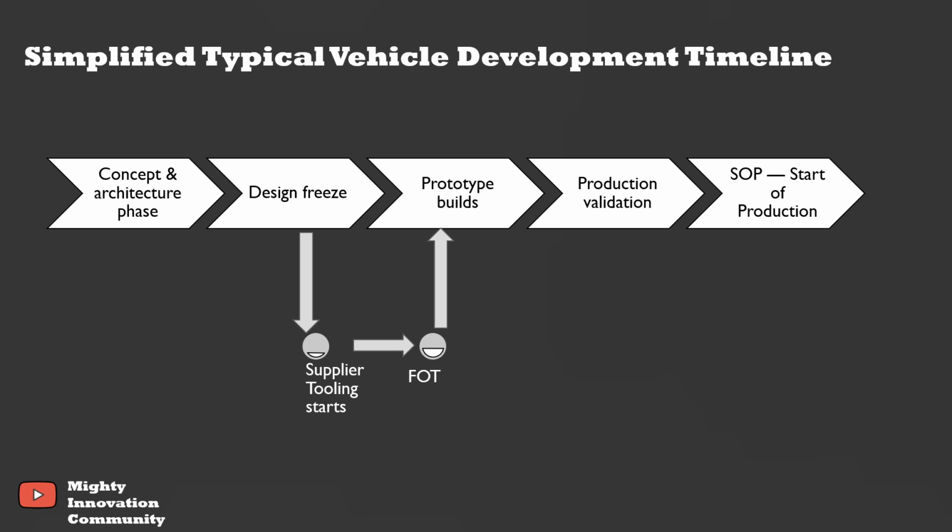So what happens if FOT is late? If a part misses FOT, vehicle builds get delayed. Temporary prototype parts are used and quality risk increases significantly. So launch stress goes up. That's why OEMs treat FOT as a very critical gate in the vehicle plan.